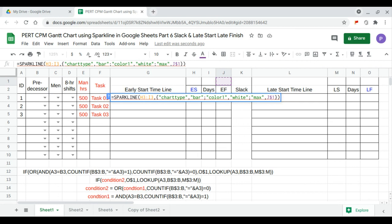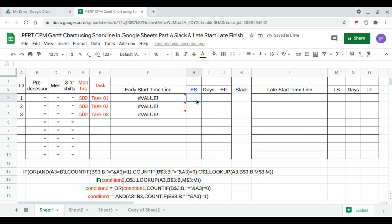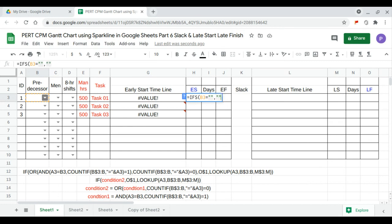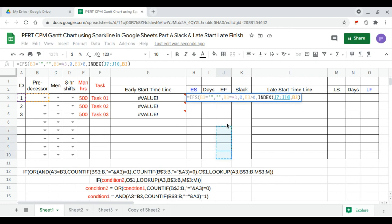We continue with the start day formula. It's equal to: if B3 is empty, then it's empty; if B3 equals the ID in A3, then it is zero — meaning the task precedes itself; and the last condition: if B3 is greater than zero, then INDEX over the end day range, using B3 as the lookup.